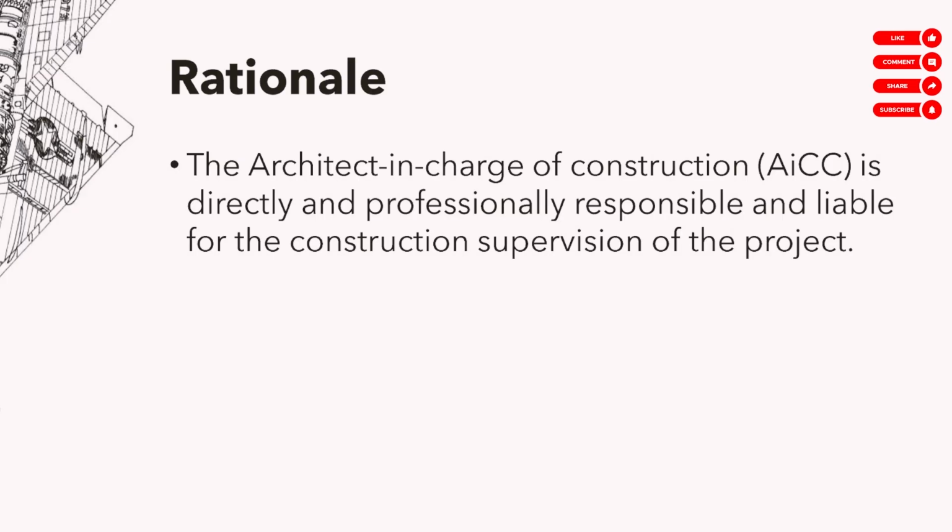Now, recap. What do we know about this? Building codes, having a building code, dapat merong full-time supervisor yung job site, yung construction. Kaya that person must either be an architect or an engineer. I think civil engineer or architect. Sabi natin, kapag architect yung kinuha, ang tawag sa architect na yun is the AICC, Architect in Charge of Construction. Okay?